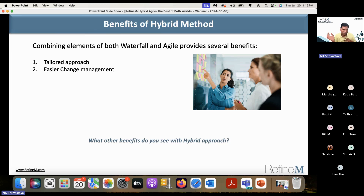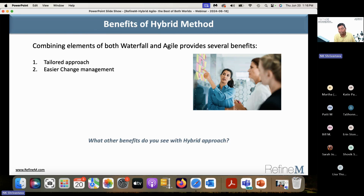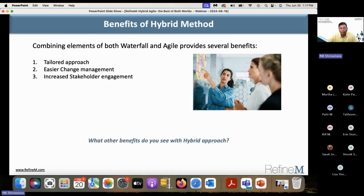Easier change management: if you bring agile concepts into your projects, agile is very flexible on changes. In a pure agile world, you don't have to go through a change control board — you take the new change and put it in the backlog in priority order. How you bring that concept into your hybrid environment is something to think about, but it will ease out change management.